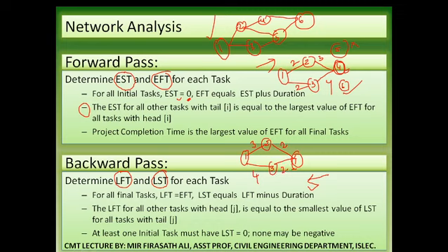Now we will come from this side. If we come from this side, 2, 4, for the first activity we will get 6 days. If we come from here, we will get 5 days. So in forward pass calculation, we have always considered the greater value. We have considered 6 days over here. But in backward pass, we need to select the minimum value. We will not select the maximum value.